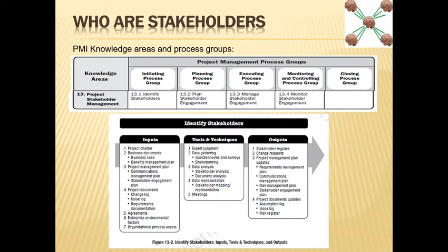When you update the communication plan, you need a change request for that. Even though I know that in most of the projects around the world, this kind of requirement is not always associated with a change request, as per the normal guidelines, if you are going to make any change in a project plan, even if it is so minute, it should be recorded against a change request so that everyone knows when, why, and how it was done.